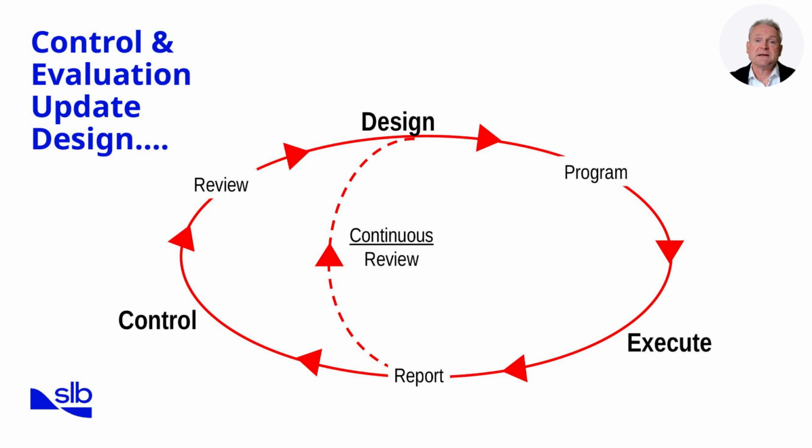Here we revisit the continuous improvement cycle where control, review, and evaluation feed directly back into updated well design. At the top, we see the design stage where the well program is prepared based on available offset data and engineering models. Once executed, performance is captured and reported through daily and post-operation reviews. This reporting forms the basis of control, which allows us to evaluate how closely the actual performance aligned with the